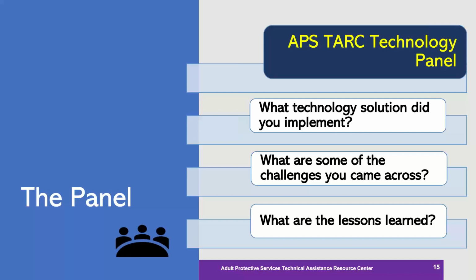So every time we had a new process, someone would create a new database, and they didn't all speak to each other. So the logistics of migrating information from 34 separate databases to a new single relational database has been really challenging. So we had to step back, rethink what was important to migrate and maybe what wasn't as important to migrate. And we did a partial migration, and we're still working and discussing what else would need to be migrated.